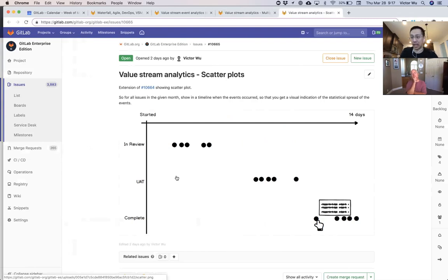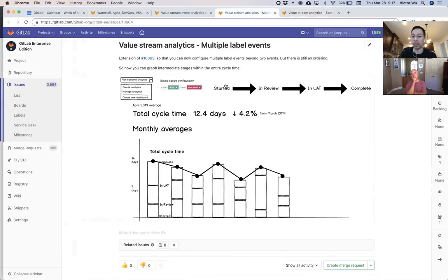And they're just crazy and they don't fit into this model because a security stakeholder can come in really early on, a compliance stakeholder can come in really late. And we know the best practices, shift left, like everything should happen earlier. If the security stakeholder comes in at the end, and you do security at the end because you don't have DAST and SAST, and then everything goes to hell at the end, and it forces all that rework, that's a really bad anti-pattern.